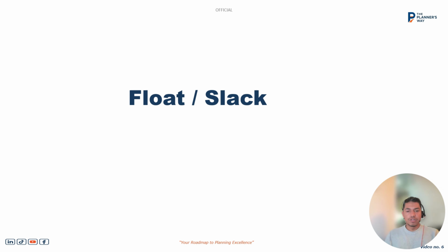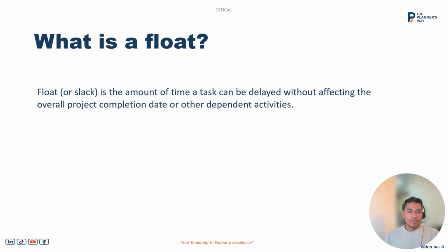Today we are going to discuss one of the key topics that we usually use in project management, called the float, or we call it slack as well in American English. Going forward, let me dive into what exactly the term float is. It is the total amount of time by which any task can be delayed without affecting the overall project completion or any dependent activities which succeed that activity.